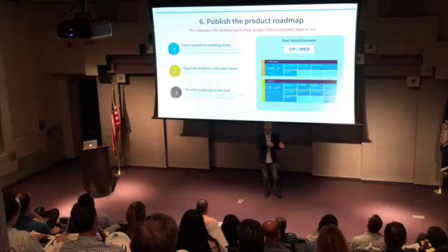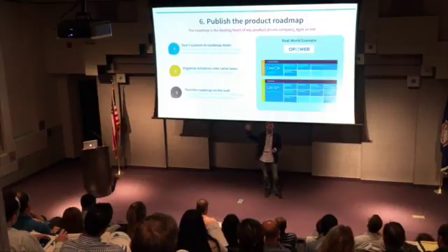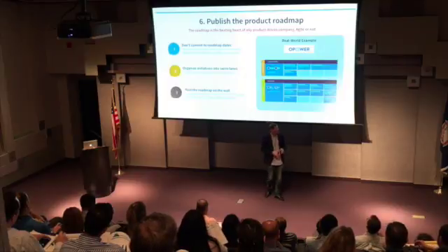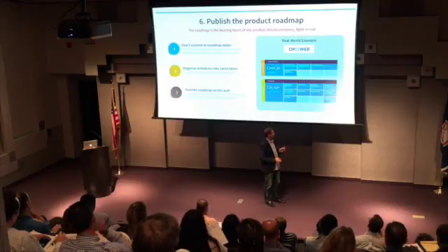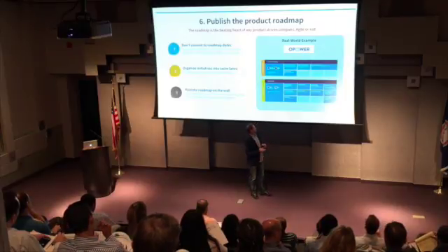So if things start going awry and we start not getting the right answers that we're looking for, we need to continue to iterate, that's fine. We will continue to iterate. It means we won't start the other project because we're going to be actively working on finishing this one. That's a way of transferring risk from one project to another. But there were certain areas where we had to do that, but we were trying to be very tight with when we did that and when we didn't.